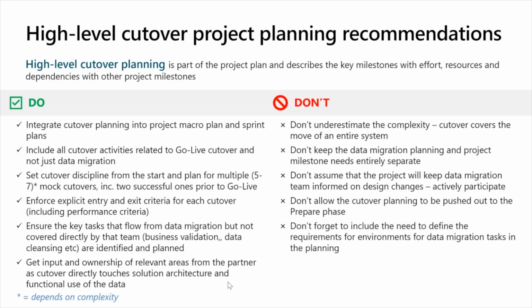By that we mean the plan that is part of the project plan and describes the key milestones with effort, resources, and dependencies, and it's tied to other project milestones like SIT, SAT, UAT, training, etc. So you're expected to meet interim milestones within the project in order to deliver the right quality of data, the right data entities for the different stages within the project.